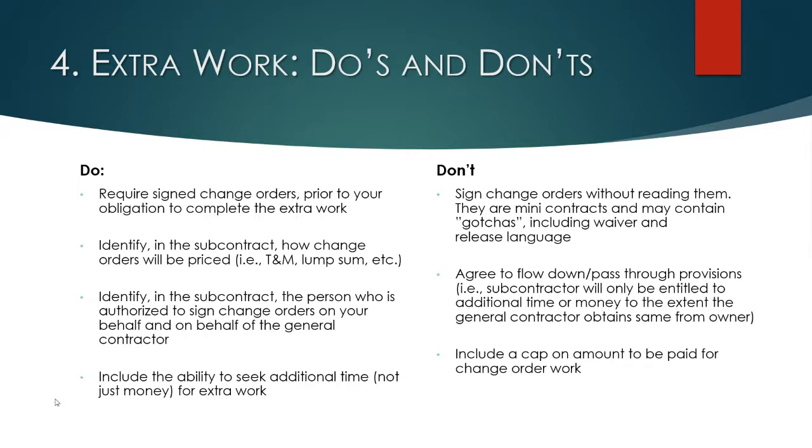Identify in your subcontract how those change orders are going to be priced. Don't leave it open to interpretation, like reasonable costs, things like that. Do your best to be specific there. Again, identify who's authorized to sign them. Include the ability to seek additional time, not just extra money, for that extra work.